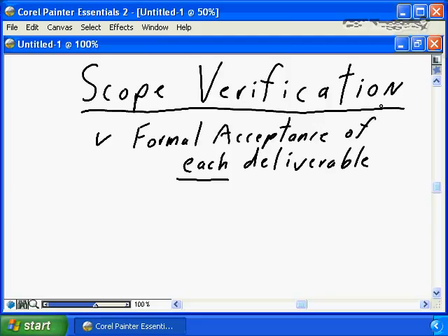You often need to institute very formal, controlled processes to ensure the scope verification happens successfully and happens in a managed environment. The first step is you need to define a specific timeline. It needs to be reasonable, perhaps as long as 2 weeks, but preferably shorter.